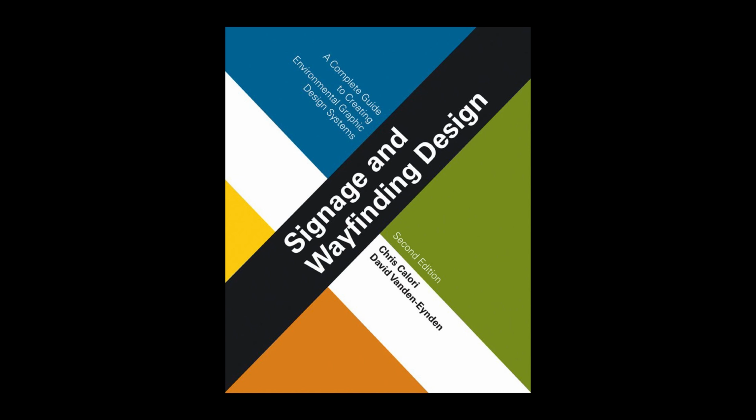See figures 2.38 and 2.39. When shop visits are warranted, they are conducted by the EG designer, often accompanied by the contract rep and/or client. The purpose of the first shop visit is typically to review production prototypes, although on some larger projects, the first shop visit may be devoted to project coordination and review of other kinds of submittals.